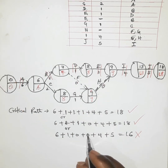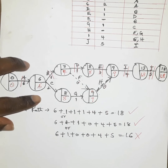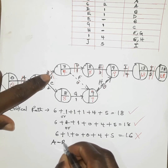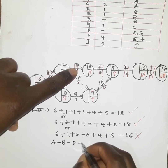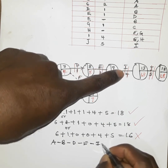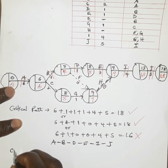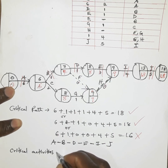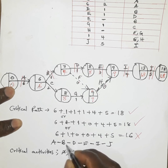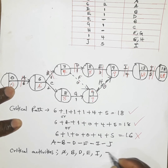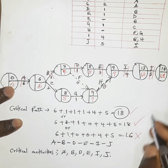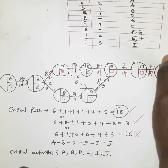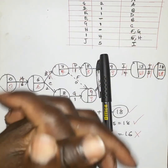We illustrate the critical path as: A to B to D to E to I to J. The critical activities are A, B, D, E, I, J. Eighteen weeks is the shortest period in which this particular project will be undertaken in order to arrive at its completion. Thank you — please don't forget to subscribe.